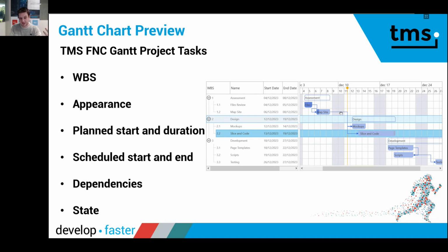So if you said it will be 3 working days, that would mean that it will take until Sunday 5 p.m. to end. But then we have, of course, the weekend in here. So that's when it says, no, it's scheduled to end at Tuesday 5 p.m. because then we have the Friday, Monday, and Tuesday to work on it. So 3 working days.